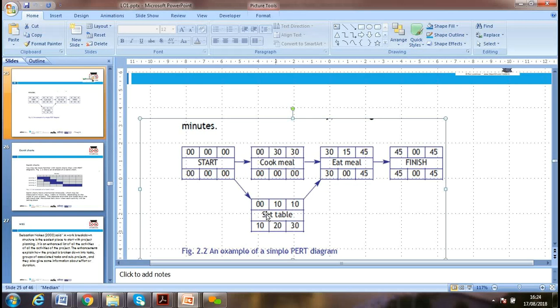So setting up the table within 10 minutes, we required to arrange it. So overall 30 and 15, that makes 45 minutes, because we're doing two parallel tasks. One requires a total of 10 minutes, and the other 20 minutes of cooking. It makes a total of 30 minutes because we're doing two activities in parallel.